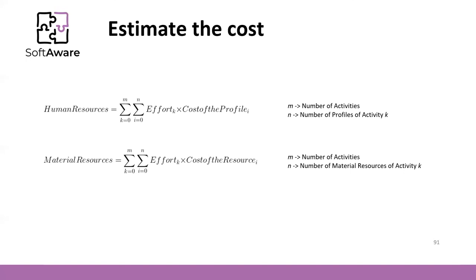Regarding the material resources, we apply the same idea. For each work package we identify the costs of each resource needed to perform that work package, then we multiply the cost of the resource by the effort and sum for all work packages to get the material resource cost. Of course, if you need a computer or cloud computing for the whole project, you calculate it across the entire project rather than per work package.